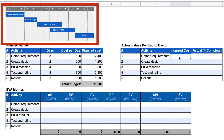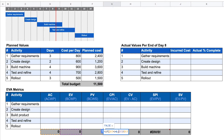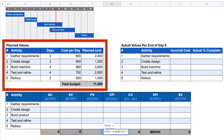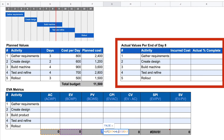At the top, you see our project schedule — remember, the time scale is in days. Below the chart, we have the planned values for our project: the five activities, the estimated effort in days, the cost per day, and the planned cost. You also see the total budget. In the right table, we list our actual values measured at the end of day eight. I have spoken to my engineers and the team and asked them about the status of activities.